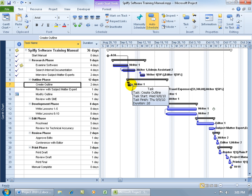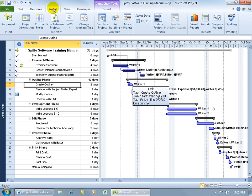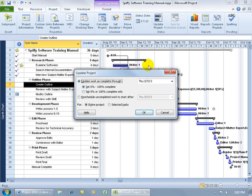So to go ahead and reschedule that part that hasn't been completed by using this feature, Reschedule Task, come up here, click on the Project tab. And be sure that you have that task that you want to reschedule selected, and then from the Project tab to the Status group, click on Update Project.